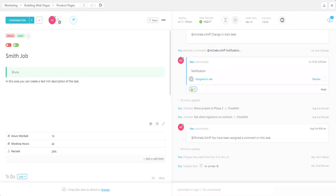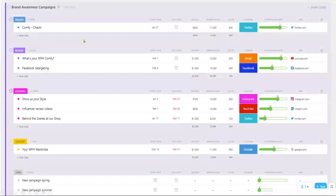Each client project task should be created from a template for consistent project management and include required and custom fields such as a task title using the appropriate naming conventions, an assignee, a description, time estimates, start and due dates, and custom fields and tags if they're being used. Some custom fields often used in marketing agencies include start and due dates, budget, channels for social media, and progress.